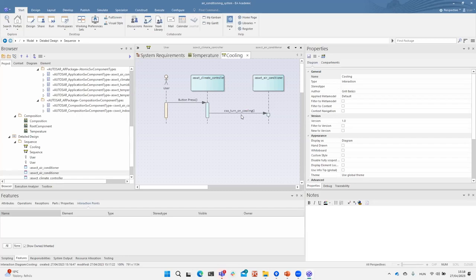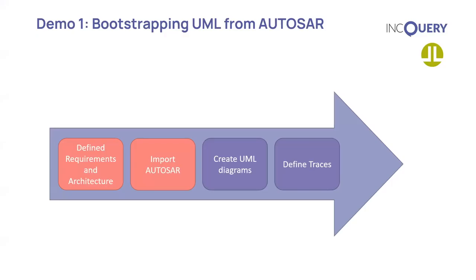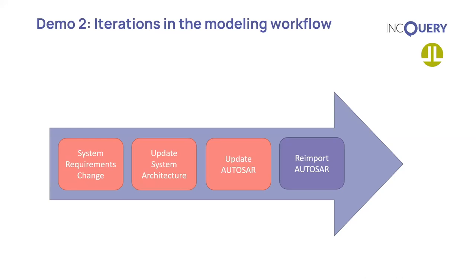In the automotive domain we are developing highly complex applications, which involves complex models edited by multiple people collaboratively. The V-model cannot be followed in a waterfall style — every process must prepare for changes that need to be propagated through each document. To ensure synchronization we adhere to the 'one source of truth' principle: every piece of information has a primary source and any redundancy shall be propagated in a single well-defined direction. In our example, we simulate a change request involving a new requirement propagated to the system architecture and then to the AUTOSAR model.